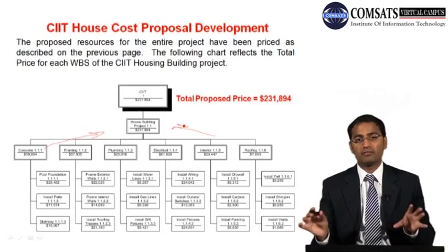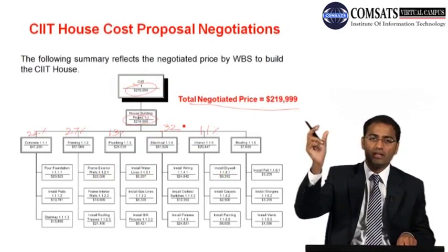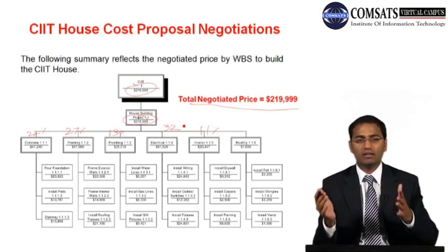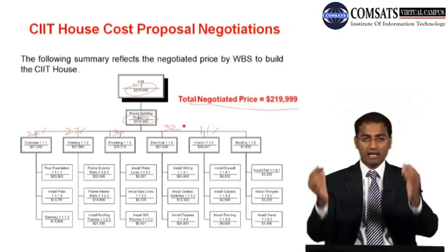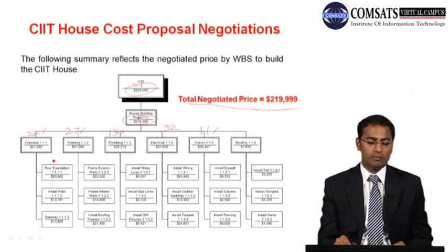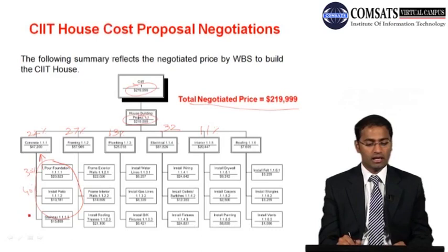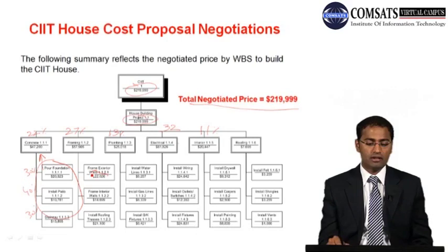So we had preserved our percentages, and one way of doing this is, if we are having now 220 at the top, but we had to shed 11,000 out of our total estimate, then we may come down with the same percentages. So similarly, they may form 100% of this, but this may be 30%, this may be 40%, and this may be like 30%. So the same ratio may be adopted, and then we assign these values again.